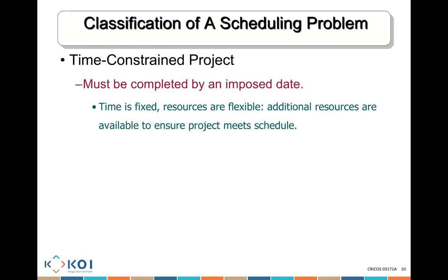Now, let's link this example to what actually happens in a real IT project in real life. If you are working with a company and the company gave you a fixed cost project, or you took a contract, you said the project is going to cost that much money, okay? You made the plan. What happens if that project takes longer? What happens to your company? It's going to cost more. Can your company say, well, it did take more time, so I want more money now? No, they can't. You have to plan accordingly. It's time constrained. I need to manage my resources well. Any problem needs to be sorted out immediately.